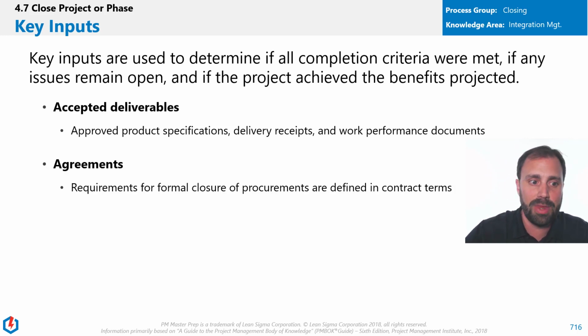So that's really awesome. And then the agreements. When we're dealing with any kind of procurements, you want to make sure that we operate toward the letter of the agreement. Make sure that contract terms are met so that we can satisfy that. Either if it's a subcontractor, people doing workforce, or we're operating under an agreement with a contract for our actual project. We want to make sure that we follow through how it's defined in the agreement to close out this project. Very, very important. And that is a key input.